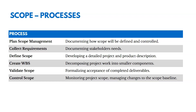Later, as we monitor the project, we're going to validate the scope — formalizing acceptance of completed deliverables. And then we're going to control the scope, monitor it, and manage changes to the baseline. We validate to get acceptance, and we control to monitor the scope and manage changes to it.